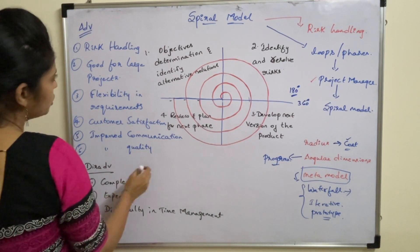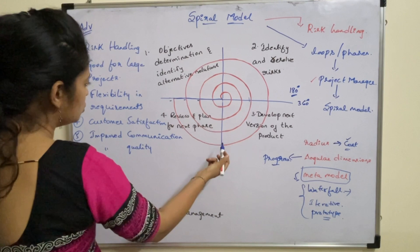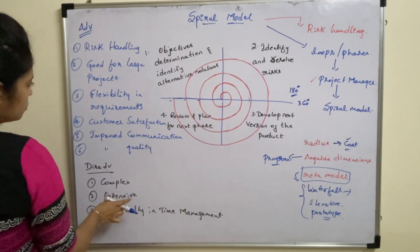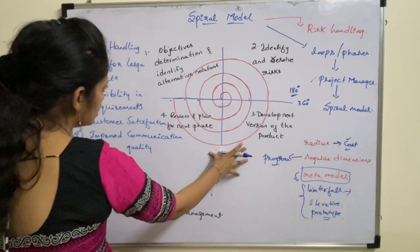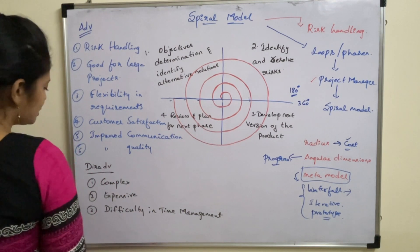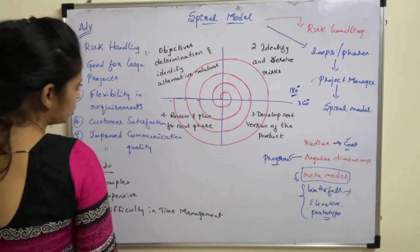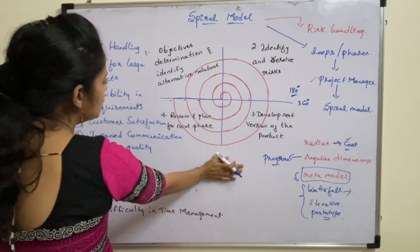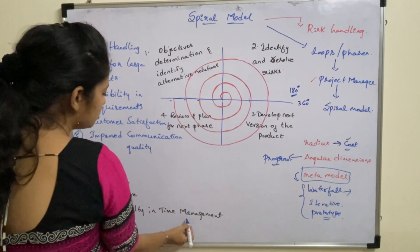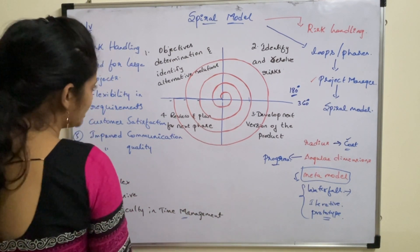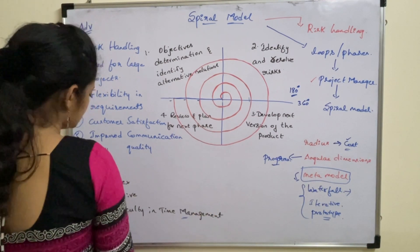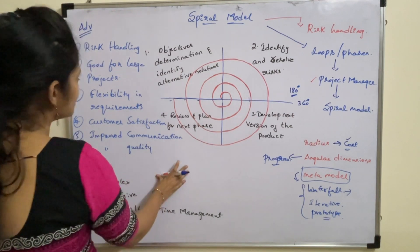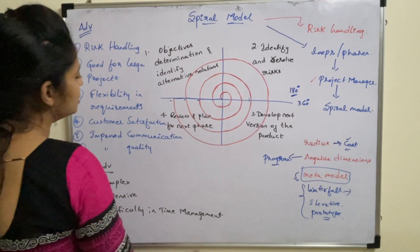The disadvantages of the spiral model are: first, it is a very complex model because the number of phases or loops is unpredictable for complex projects. Second, it is expensive and not suitable for small projects. Third, difficulty in time management — since the number of phases is not known at the beginning, it is not possible to estimate how much time is required to complete the project.